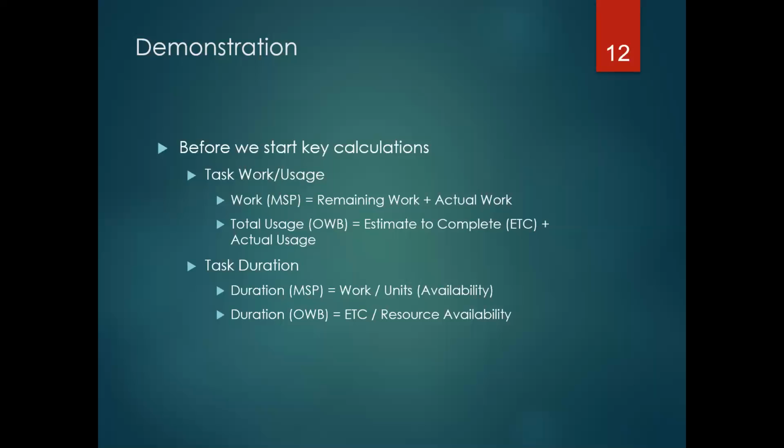driving anything that's rooted in reality, unless the durations that you are arguably fixing by putting in start and end dates are rooted in history, and you know those are the durations of what the organization does. And then at that point, effort-based scheduling becomes meaningless, because now you have an analogous estimate that works for you, because you have duration estimates as opposed to work estimates. So let's go into the demo, hopefully, and then we'll go into the challenges.